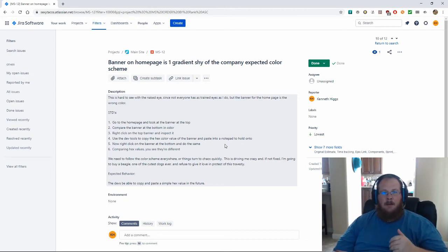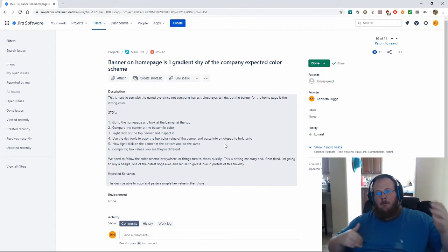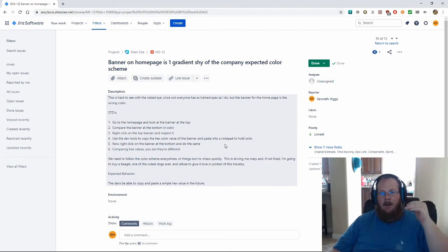And that reduced the inflow of bugs considerably, and the quality of work didn't go down, because most of the stuff that was being reported was just being ignored as low priority. So instead of reporting them and ignoring them, but keeping them around in a massive pool of 1,600, we were able to go through and start removing the things we knew we were never going to fix and take care of, and brought down the number to like 200 issues.